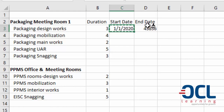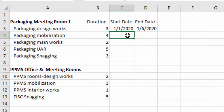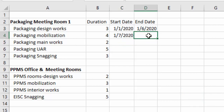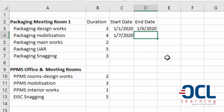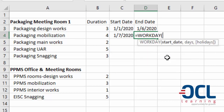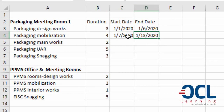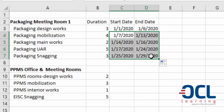For the WORKDAY function: the start date, then comma, we include the duration, then we format this as a date by going to Format then Format as Date. The next start date for the next task will be the end date plus one day so that it starts on the next day. Then we use the WORKDAY function again — start date comma then the duration of the task — and format this as well. You can also drag this down.